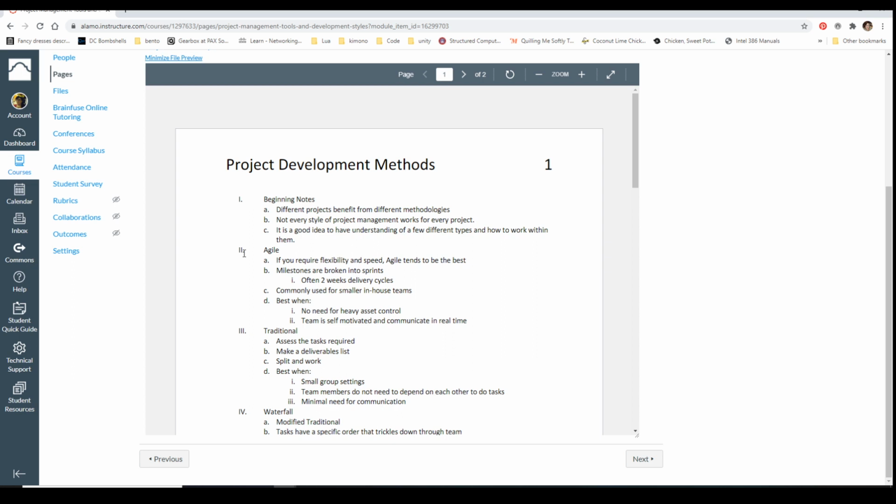So basically, when it comes to agile, you have milestones, which are the major points. Sometimes it's as big as alpha, beta, release, those being your milestones. Sometimes it's as small as level 1, level 2, level 3. Sometimes it's even smaller. And then the milestones themselves are broken down into sprints, which are kind of like mini goals. Generally they're about 2 weeks, and it says, hey, in this 2 weeks, you need to deliver all of these tasks. Generally they're prioritized, but sometimes it's just a giant list, and as long as you complete these in 2 weeks, then we can move to the next things.